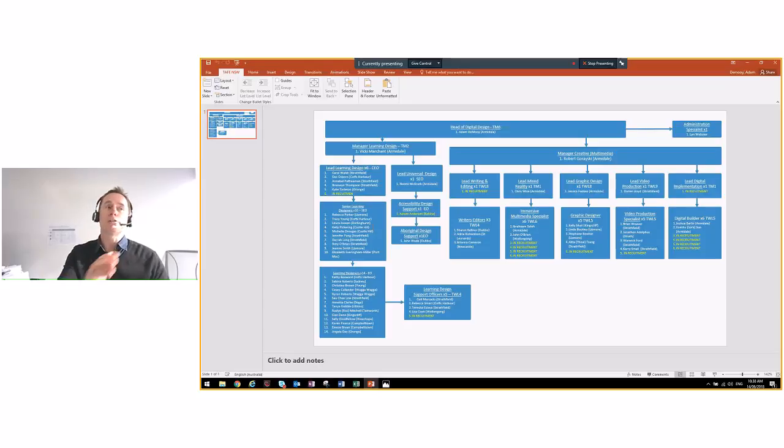A senior learning designer will be appointed as the devoted project manager for it, and we'll pull together a production team of designers out of that pool, based on the required skill sets for the given project and availability of people, in terms of who's got bandwidth to be able to come in and fulfill the project requirements. So that's how that part of the team is structured. As I said, they're very geographically dispersed, so that's one of our challenges.